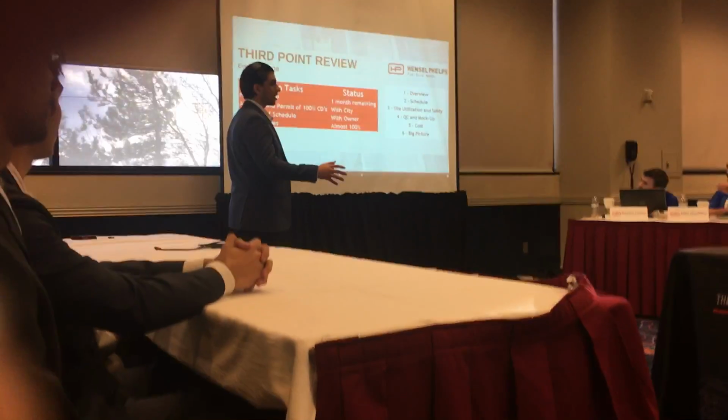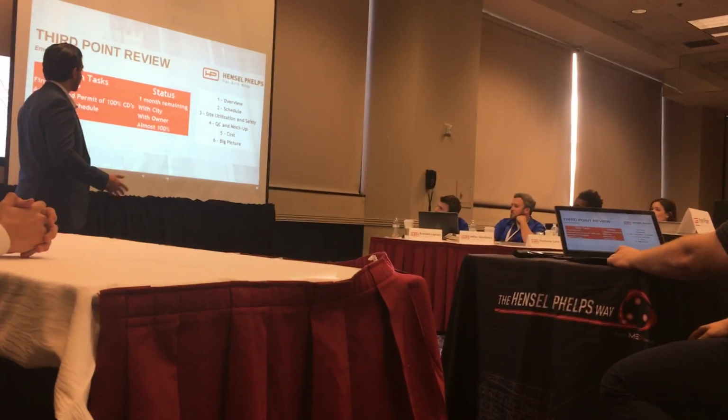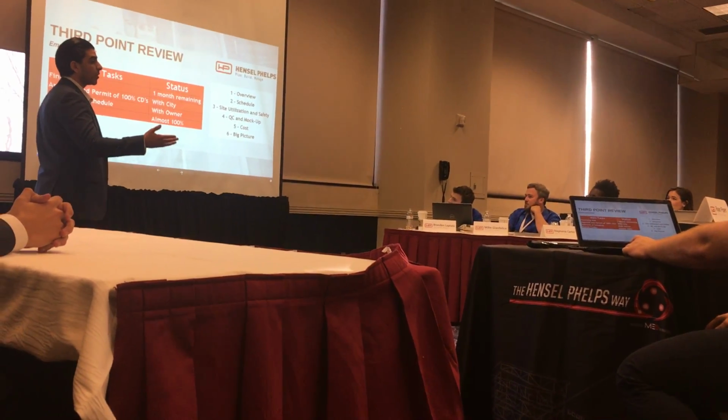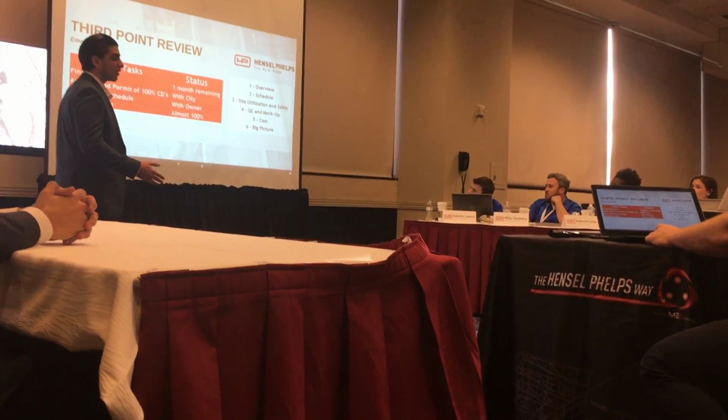Months into pre-con, and we're ready to start construction. So we're trying to get approval and permitting of 100% construction documents, and that's with the city and the OSHPD plan checkers right now. Approval of the schedule, we need to get that from the owner.